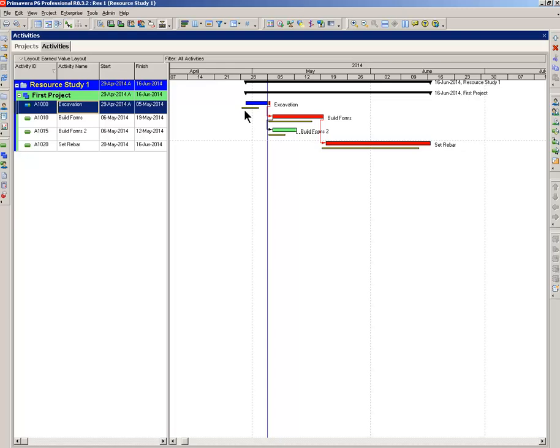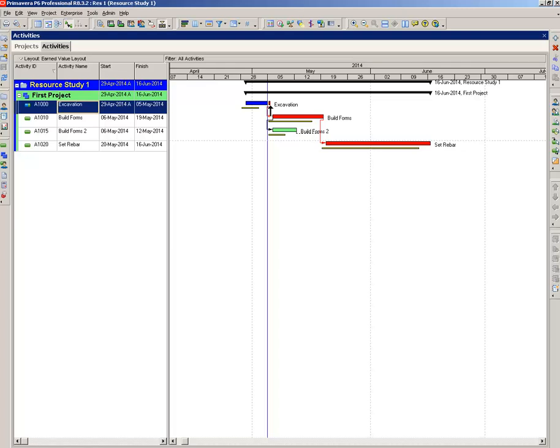Now you can see this project was baselined for a start date on April 28th. The project has been updated once to May the 5th. The project had a one-day delay in getting started. The duration of this first activity was the same as what was expected. So instead of finishing on Friday, the activity's finishing up on Monday of the next week, pushing the rest of the activities out a day. Very simple, but I wanted to keep it that way to show you how this earned value works here.